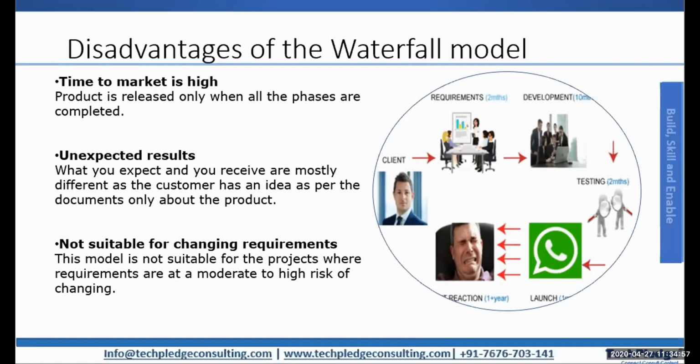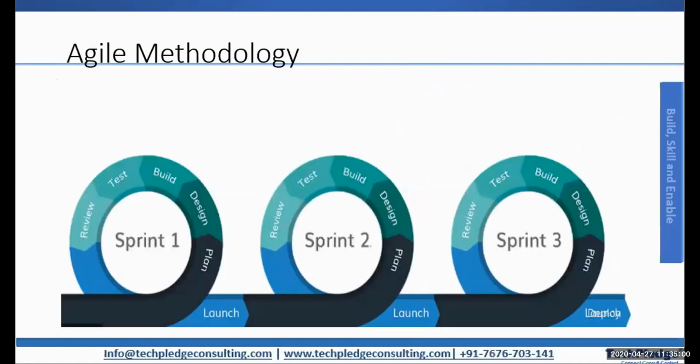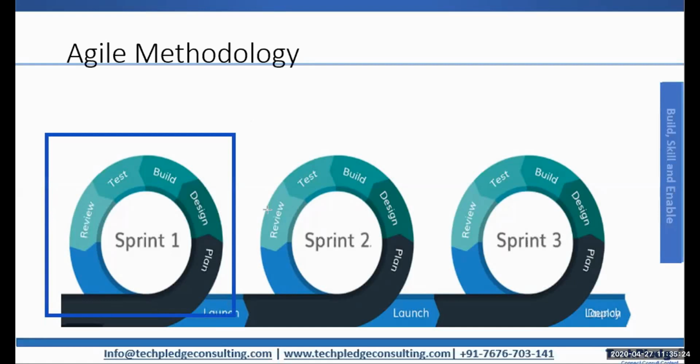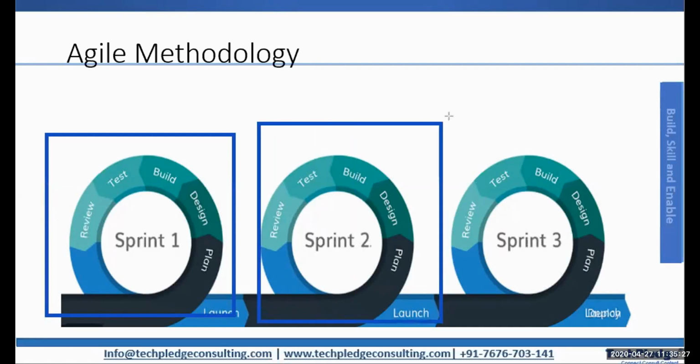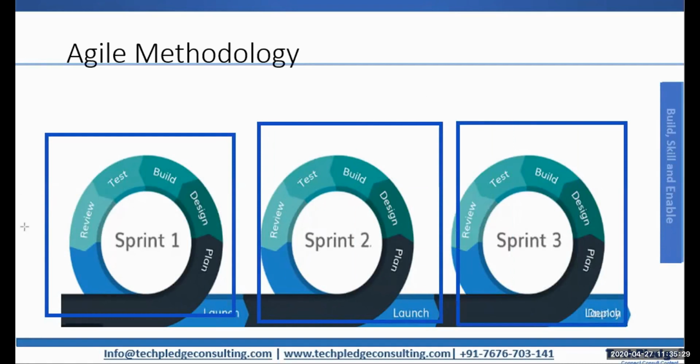So this is the reason we moved to agile methodology. In agile methodology, we divided a project into certain parts. Let's say you are working on an e-commerce project. I start first with, say, the customer portal as one part. The vendor management portal is another part. The transportation could be another part. One by one, stage by stage, we would develop, deploy, and launch.